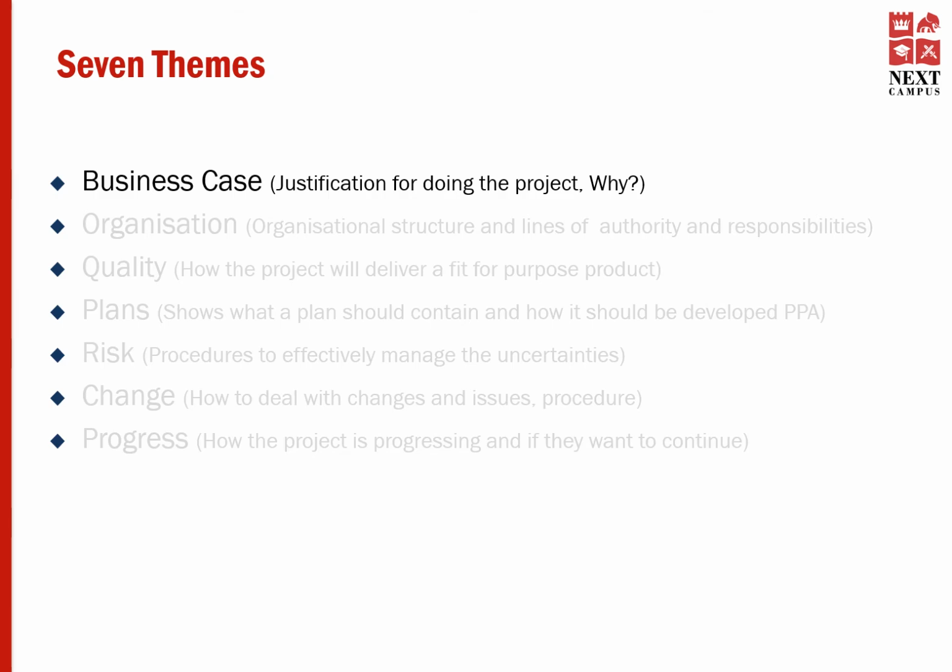The executive is responsible for creating the business case, but it can be written by others or with help of others. For example, the executive might involve a person from the financial department to assist with all financial information. The project mandate document usually contains an outline of the business case.